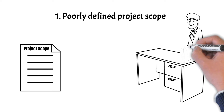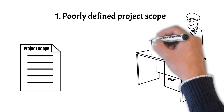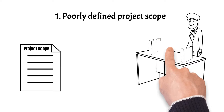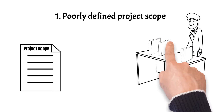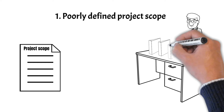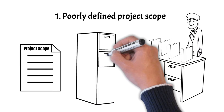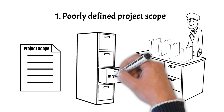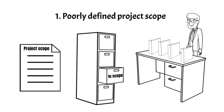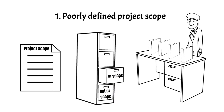Scope creep refers to the uncontrolled expansion of the project scope, which can have a severe impact on project timelines, budgets, and overall success. To avoid this pitfall, take the time to thoroughly define the project scope, involve key stakeholders in the process, and set realistic boundaries for the project from the outset. Establishing a proper change management process will help as well.